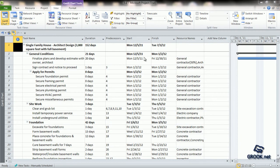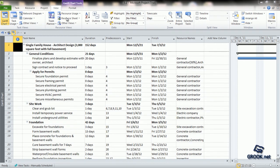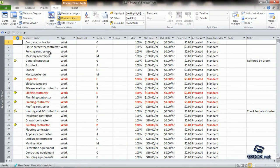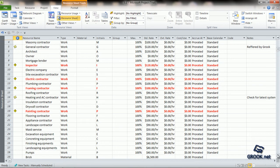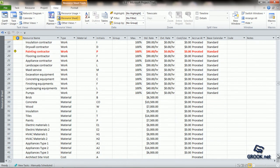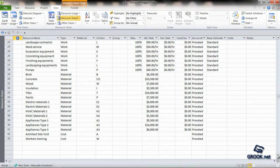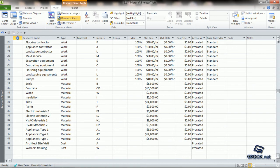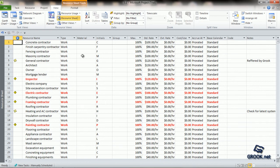Coming back to the project plan we had prepared, we can see that we had already entered the task names and related information like the duration, predecessors, start dates, finish dates, and resource names, which are visible from the Gantt chart view. If we go to the resource sheet, we can see a large number of resources entered — work resources including persons and equipment, material resources, and cost resources — along with their standard rates and maximum units of usage. We have also seen how to assign these work resources to specific tasks.